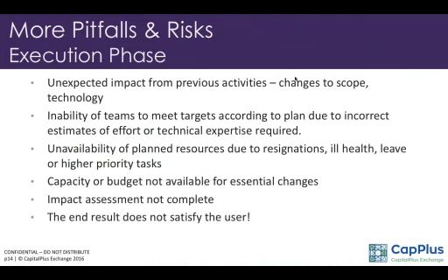Planned resources, as you know, people may resign, they may go on long leave. They will be assigned for other priority tasks. I had a situation where there were 3 project managers during a space of 8 months, which shouldn't have been the case. And when you have changes like that, these are huge risks, and it will cause delays and project cost overruns and stuff like that.